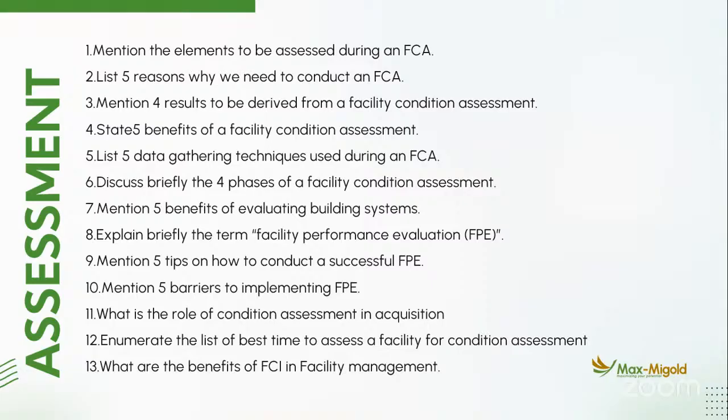So you use that to calculate the number of tiles that you are going to change and at what cost. What will be the cost of the sand? The cement? The tiles? And what will be the cost of the manpower for changing those tiles? Your floor tile doesn't go into your asset register. No. But your television goes into your asset register. Your building wall doesn't go into your asset register, but you assess your building wall when you are doing your assessment. That's the difference between the two.